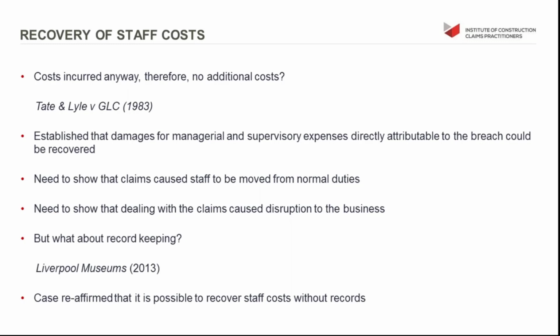And in terms of construction claims, that's where you would use your own staff on recovering the claims costs, where you would bring in your planner to do the delay analysis, where you might take a quantity surveyor away from measurement duties to do some quantum work on a prolongation claim, where you might tie up your project manager for a few days or a few weeks, going through his diary and dealing with the events that caused the claim. Those are all circumstances where managerial and supervisory staff can be put forward for recovery within a construction claim.